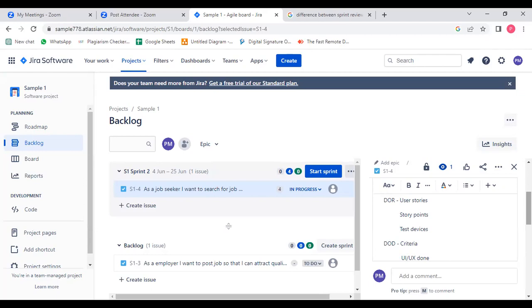Whether it has business value, whether the development team is clearly defined, whether the user stories are clearly explained, whether it can be achieved in the sprint, whether the measurable testing can be completed, and whether any dependencies are identified, will be given in the DOR.